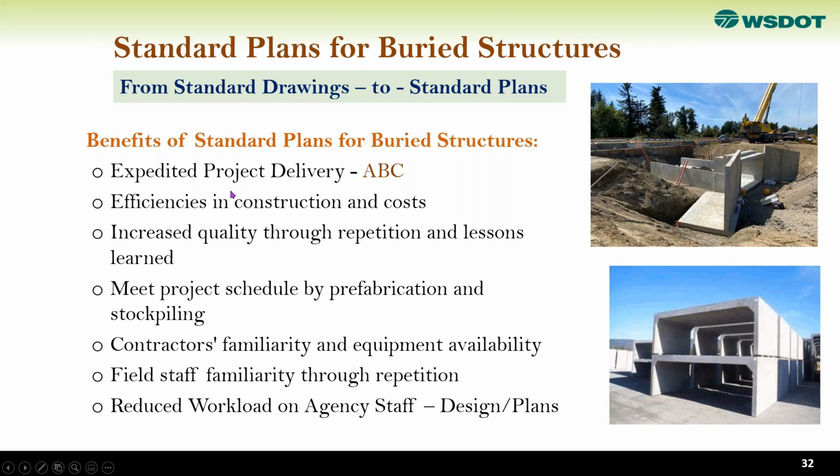That expedites our project delivery for the ABC consideration, gives efficiencies in construction and cost, and increases quality through repetition and lessons learned. It helps meet project schedule by fabrication and stockpiling, as you can see here. And because we are dealing with the fish window, the contract can go out at any time.